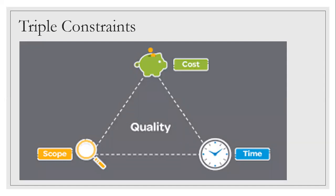When a scope change comes in during project execution — like adding more cameras to a CIS project — you analyze whether it leads to more cost, crosses the project budget, or increases the schedule. In a fully contractual project, if a change request impacts any of the three baselines, it goes to the change control board. Change control board exists in most companies, but in service companies it specifically decides whether a change should take place or not.